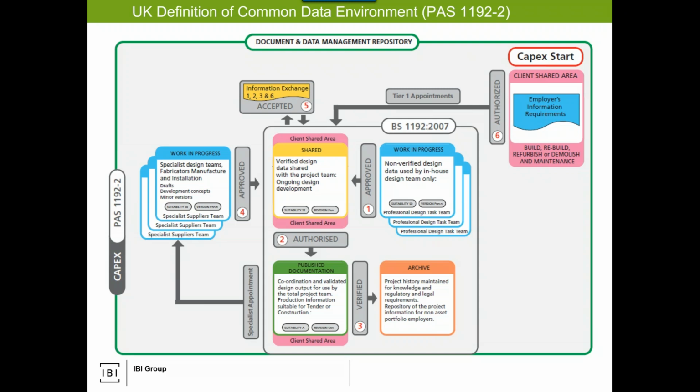And then I'm going to say to you, okay, I have some fundamental things set. Go ahead and start. If I was a house, I know where the basement is and I know where the garage is going to be. So then the civil engineer can start doing the site layout, road access, etc. So I've deemed something shareable for a specific engineer. But I might still say to structural and MEP for inside, still wait.